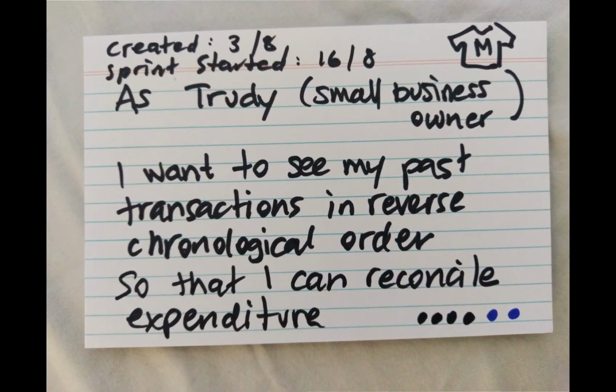The way that I would help my teams to record this is really super low tech. Every day when we get together in front of our Kanban to talk about what our daily plan is, I put a dot. So, this particular user story, a size medium as you can see, is created on this date, the sprint started on this particular date. How long has this card, this feature, been in the system?